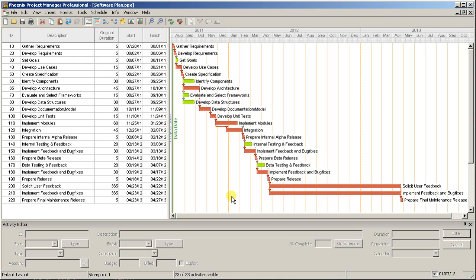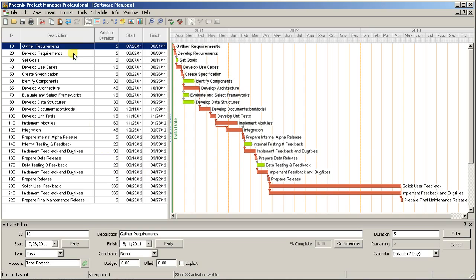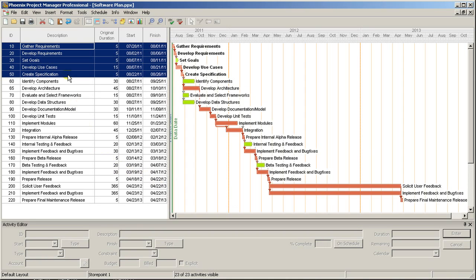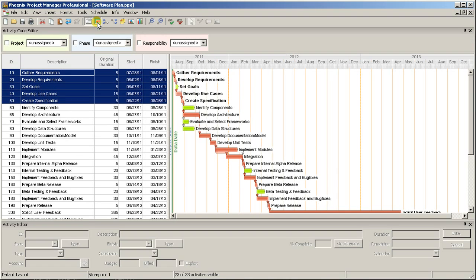First, select the activities that you want to code, in this case with the Requirements value for the Phase Code. Open the Activity Code toolbar by clicking the icon in the menu bar. Find the Phase Code and select Requirements. The selected activities have been coded.